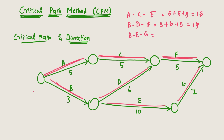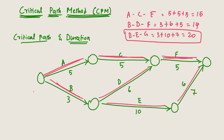For path B-E-G: 3 + 10 + 7 = 20 days. The path containing the maximum duration is B-E-G, so B-E-G is the critical path. If any delay happens in activity B, E, or G, the entire project duration will be delayed. That's why it is called the critical path — critical means it is a very crucial one.